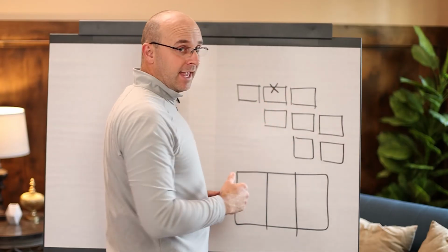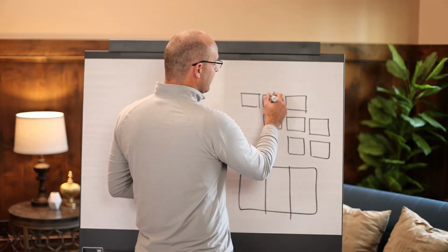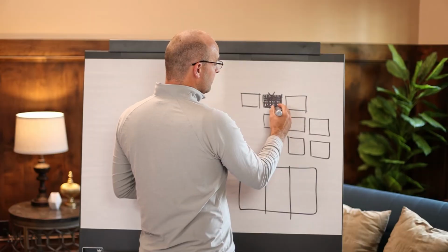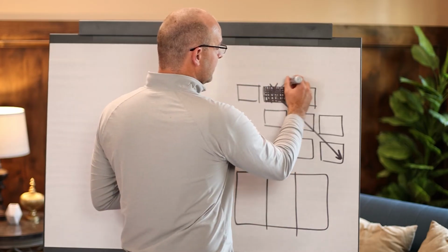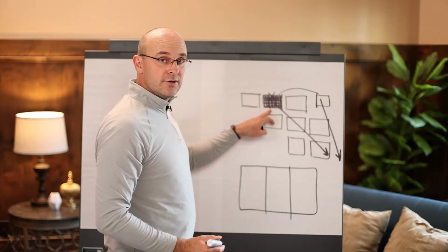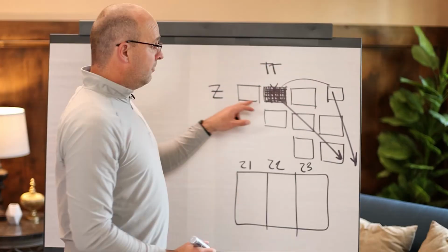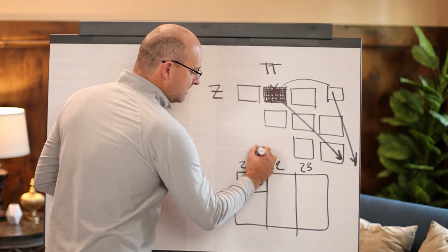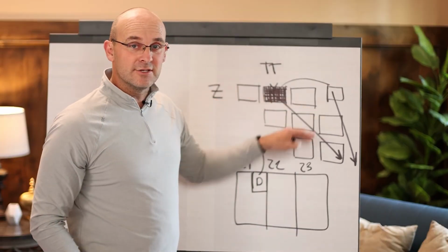But if you can't, the next option is to isolate that delay, which is option #2. Then what you can ask is, hey, can this car be taken out of the train, or this tact wagon be taken out of the train and put on its own tact time? So instead of going in this line of balance at that tact time, maybe we delay it to where this activity happens later and it's on a different tact time and it's isolated. The other thing you can do with this work is to say, okay, the work that was supposed to happen in this zone at this tact time, maybe since this is in zone #1, is there a specific area where that delay happened that can be detached from the overall production rhythm of the floor within the zone so that it doesn't affect the schedule in its entirety?